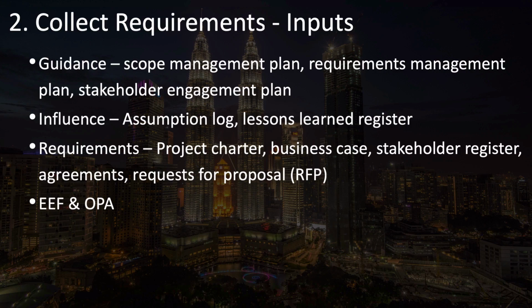There are also a few places you can go to find requirements that have already been identified that you can use to begin your process of collecting requirements. These include, of course, the project charter, because it has high-level requirements and the deliverables mentioned in the project charter.